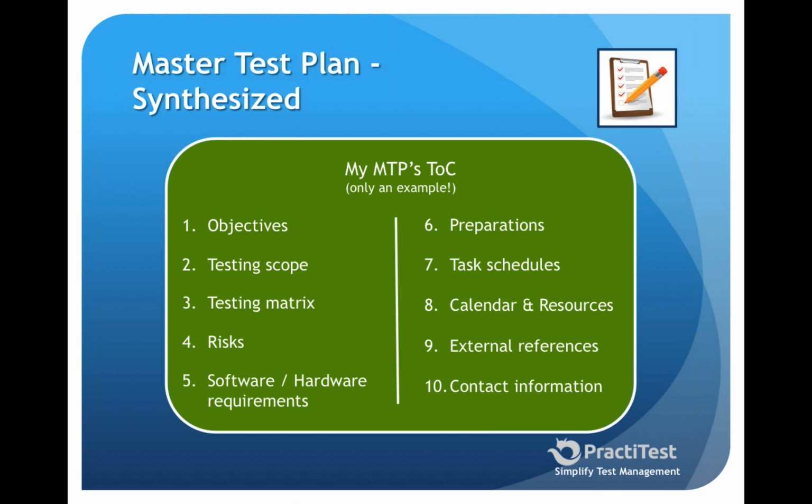The input for your software and hardware requirements comes from your testing matrix. But if you send your testing matrix to your manager and say, can you approve me to buy that stuff, he will look at you and say, what do you want me to buy? Please be more specific. That's what you want to have here. Part of the feedback I have gotten on section 5 is, you're asking for too much. Then you point them to the testing matrix and say, okay, what risk do you want me to take? And people say, I don't want any risk, so go ahead and buy what you have in there. It's important to have it in two different sections because it will make your case stronger when you need to buy tens of thousands of dollars of equipment.